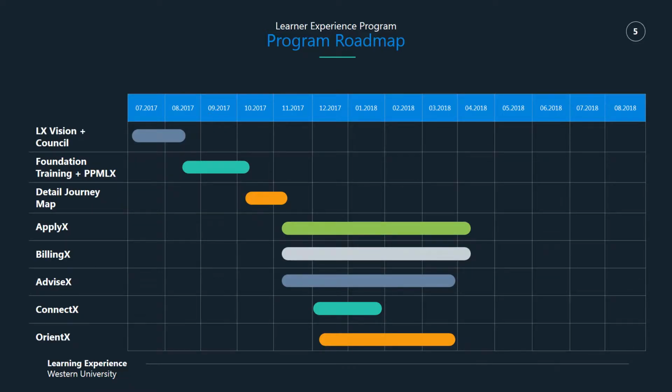For our program roadmap, you can see how we've segmented the various projects that are in the program and the various activities that we have going on. As you can see, our tentative schedule right now doesn't see feasible our original goal of completing within the calendar year. So within December 21st, I believe was the date, clearly we're into about here on the program.